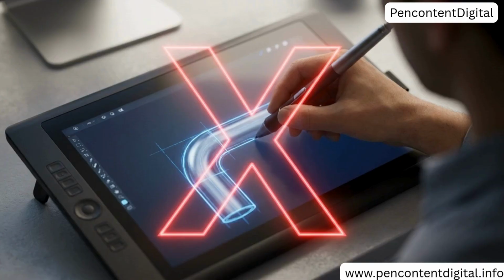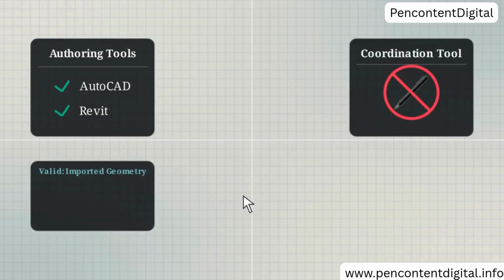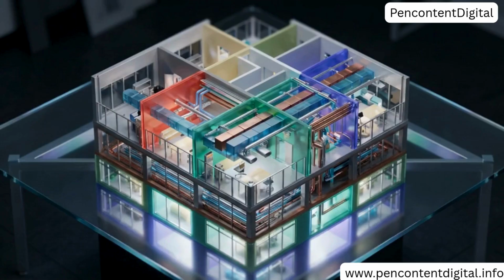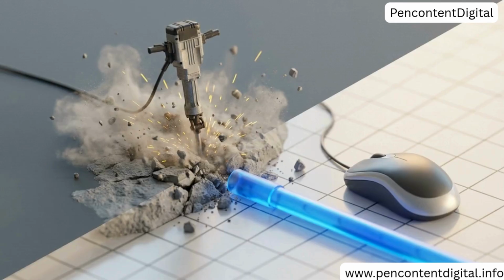There is a common misconception about the software. Navisworks is not a primary authoring tool. Unlike AutoCAD or Revit, it is not used to draft the original 3D geometry of a pipe or a steel beam. It is strictly a project review and aggregation environment. Its function is to intake thousands of independent data points and detect the errors between them. Navisworks shifts the entire cost of conflict resolution from expensive physical demolition to inexpensive digital adjustments.